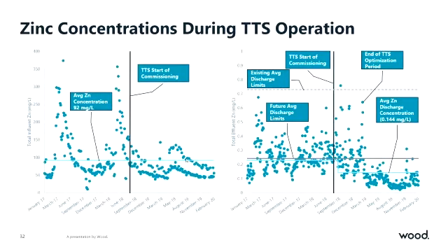On this side, you can see the effluent, and it's a very busy figure, but the main thing I wanted to point out is all the scatter associated with seasonal variability and changes in mine flows. And then this line right here is where we started commissioning the temporary system, spent about 2 months or so over in here somewhere, running that in parallel with the CTP to prove that process again so we could mitigate project risk.